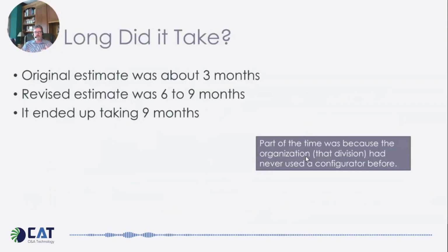What's possible? How should we use it here? So we've done other projects, one where someone was using a configurator that was going obsolete, and they already had the configuration data. It was current. They understood the concept of the configurator. We estimated to do just 4 part numbers in 3 months, but we actually did 26 part numbers in 3 months.